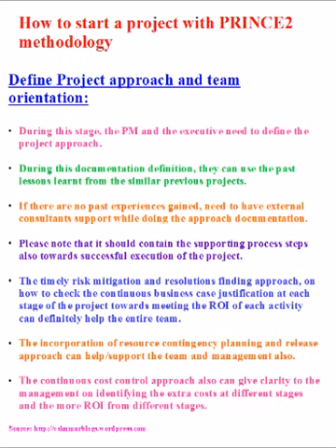The incorporation of resource contingency planning and a release approach can help support the teams and management also. A resource contingency plan means, if you have one highly technical resource, let us say one DBA, database administrator, they are very hot in the market, and the resource is sick for one week, an unexpected leave, then what are you going to do? Nobody is there in the project. So you need to plan in advance for resource contingency, like backup resources or backup people. Each of them needs to share the activities.